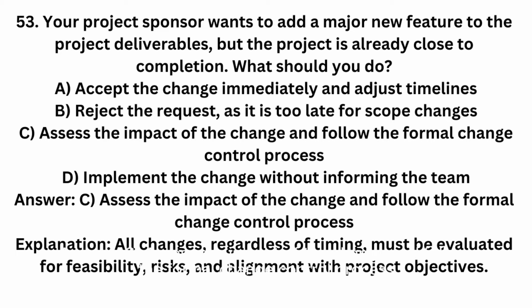Answer: C. Assess the impact of the change and follow the formal change control process. Explanation: all changes, regardless of timing, must be evaluated for feasibility, risks, and alignment with project objectives.